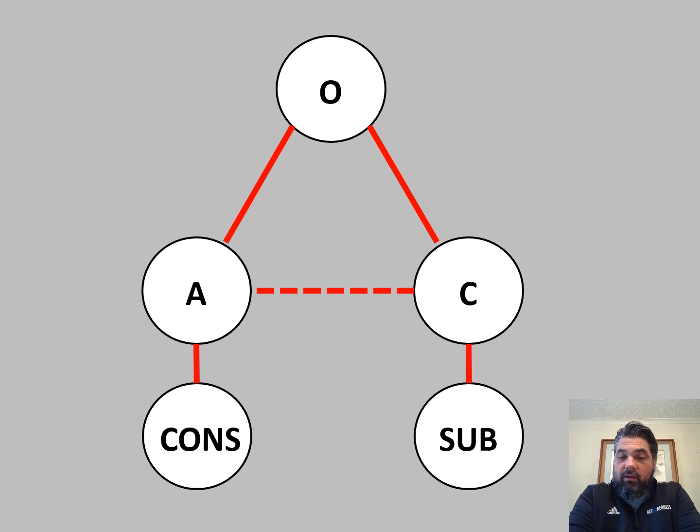Then, once you have done that, you will bid the project. And when you bid that, there is this moment of truth, where you know if the project, based on the bids you receive, is within the owner's budget. If it's not, you may have some changing to do in the drawings in order to accommodate that. If it is, of course, then the owner would sign an agreement with the contractor. And that's the relationship shown here in this line.